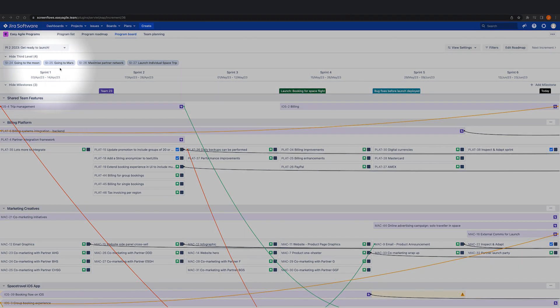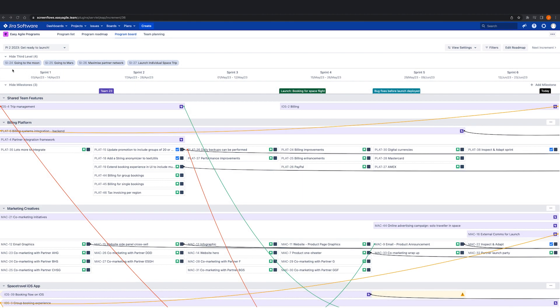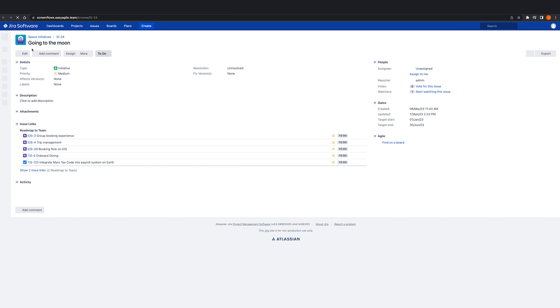The third-level hierarchy issues across the top here provide teams the much-needed context of the bigger picture of what the business cares about and how the work they're delivering ladders up to high-level priorities and outcomes. Third-level issues come from a dedicated board nominated when a program is created.